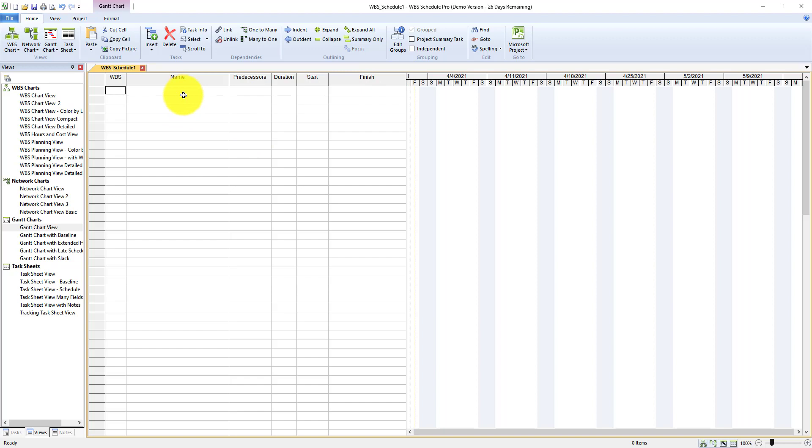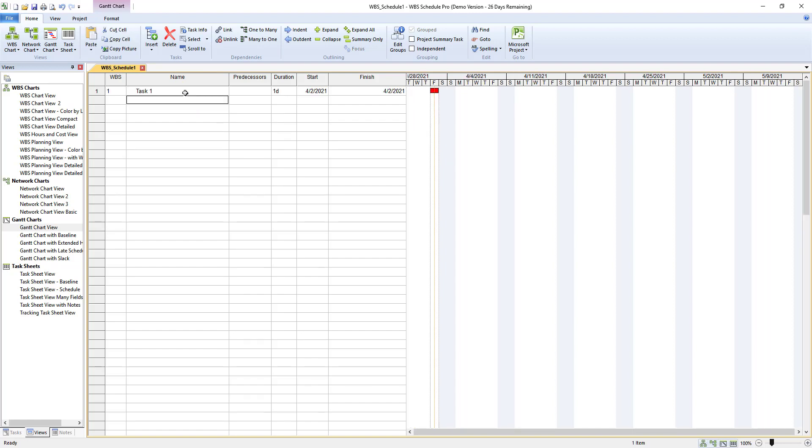I'm going to simply create by clicking on name and call this task one. You'll notice when I do that a few things happen. WBS gives it a numerical value ID of one. It sets the duration to one day and sets the start date and finish date to today.